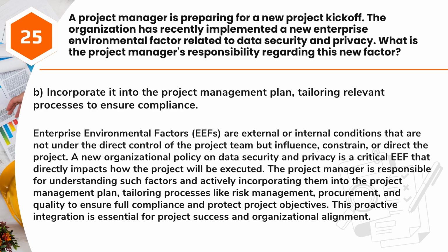A new organizational policy on data security and privacy is a critical EEF that directly impacts how the project will be executed. The project manager is responsible for understanding such factors and actively incorporating them into the project management plan, tailoring processes like risk management, procurement, and quality to ensure full compliance and protect project objectives. This proactive integration is essential for project success and organizational alignment.